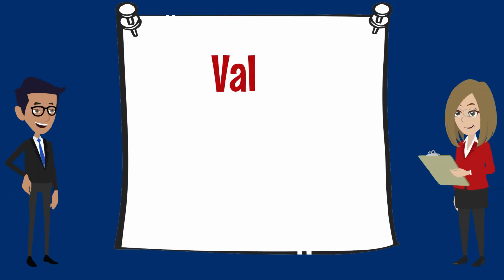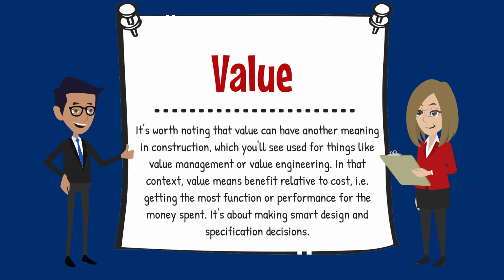It's worth noting that value can have another meaning in construction, which you'll see used for things like value management or value engineering. In that context, value means benefit relative to cost, i.e. getting the most function or performance for the money spent. It's about making smart design and specification decisions.